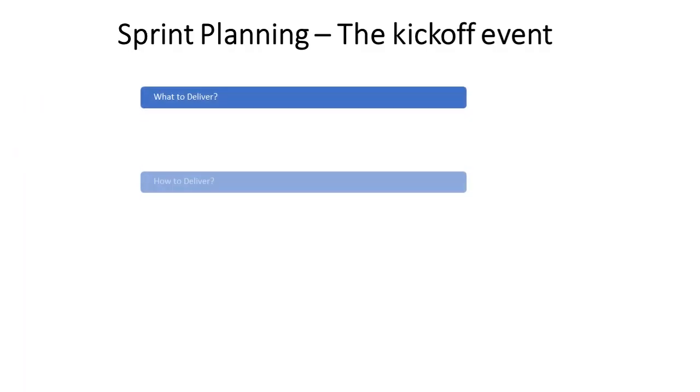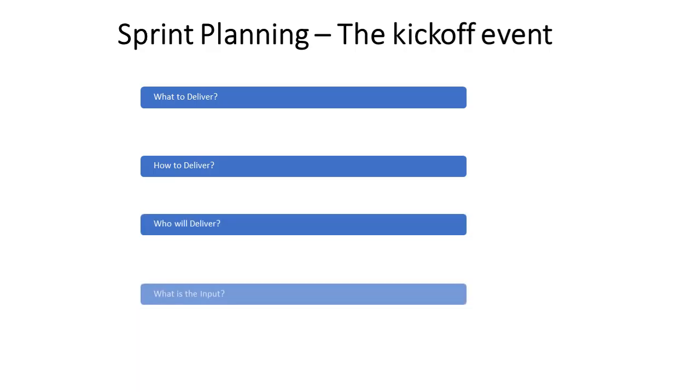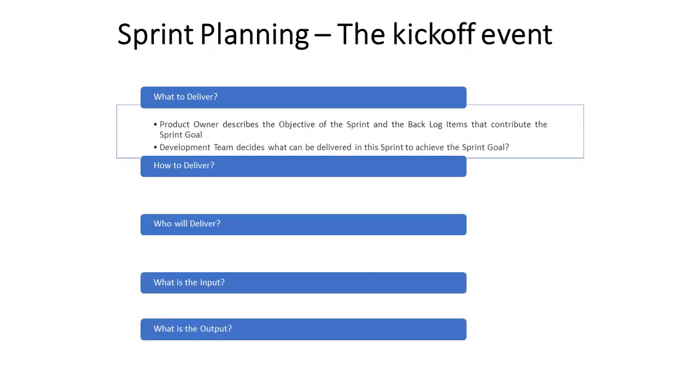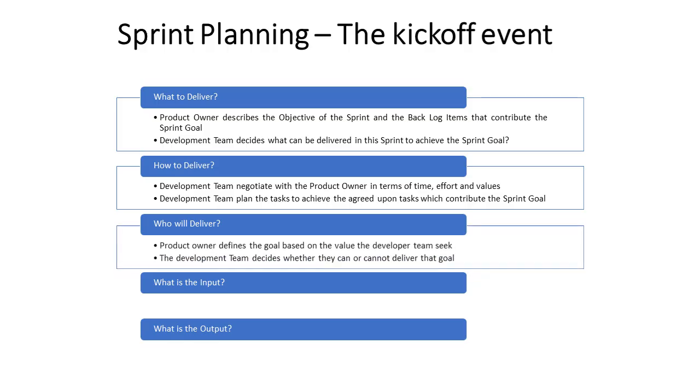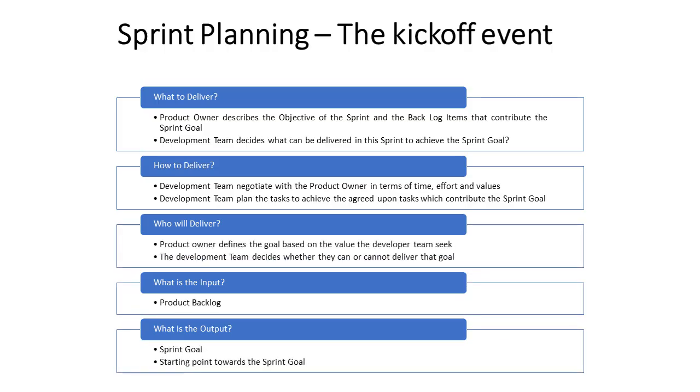Sprint planning serves as the kickoff meeting for each sprint in the Scrum framework, setting the foundation for the work to be accomplished over the upcoming cycle. During this event, the entire Scrum team, including the product owner, Scrum master, and development team, comes together to define the sprint goal and select which items from the product backlog will be tackled in the sprint.